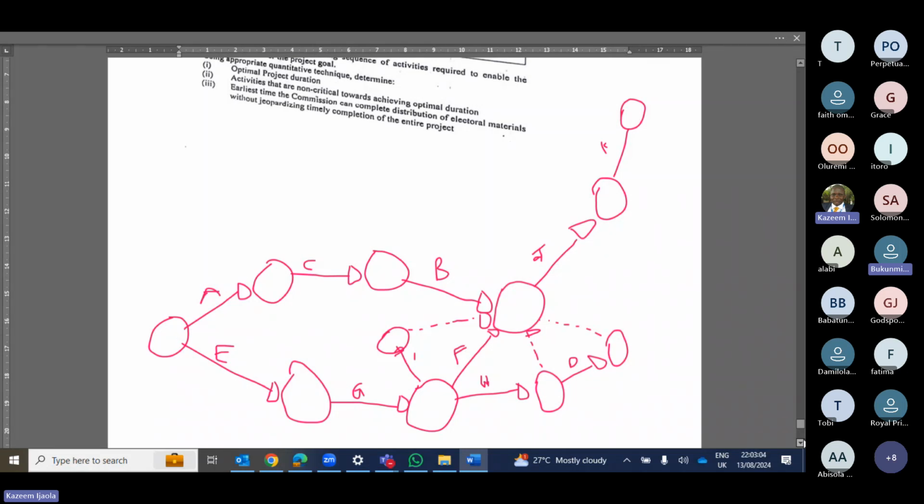I think you have answered the question. Oladiran, you are correct. Sorry, one minute, guys. You are using a dummy to connect with an activity. So which activity are you connecting I with? It is J. Remember, dummy will not have any time. Dummy is zero cost and zero time.